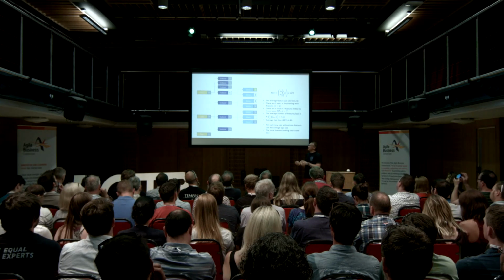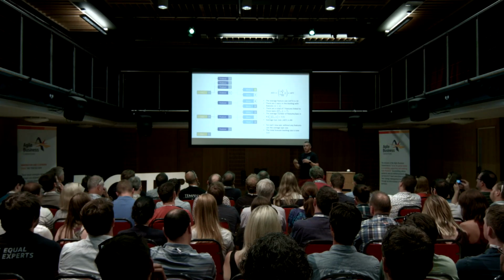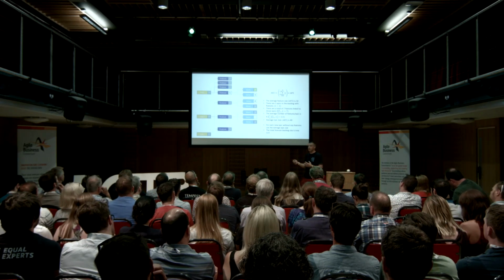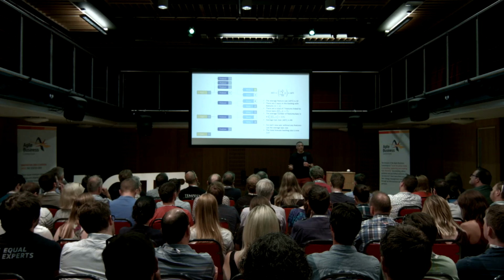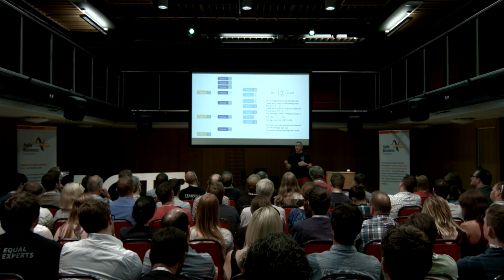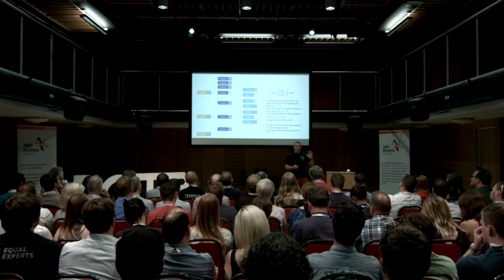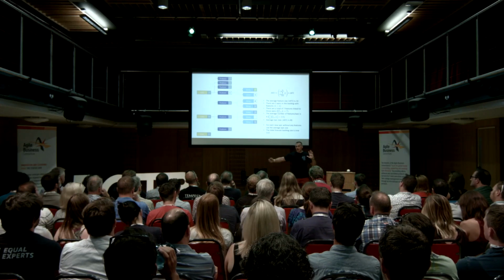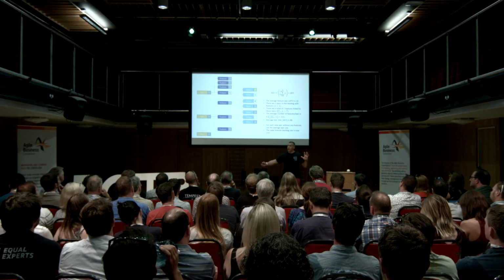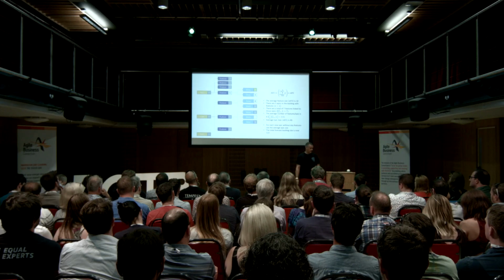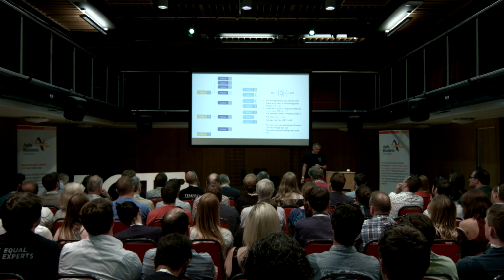Now, this is still an estimate. We're not saying this is definitely going to be 113 points, but we have started to identify a certain amount of risk in our project, in our planning. We've said we know we've got 18 points, but there's probably a whole bunch of extra work that we need to start thinking about, or at least considering when we're talking about forecasting.